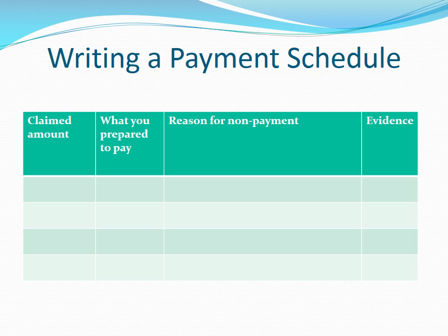Next, state the reason for not paying the difference between what is being claimed and what you are prepared to pay. Next, you list the evidence you rely upon to support your reasoning.